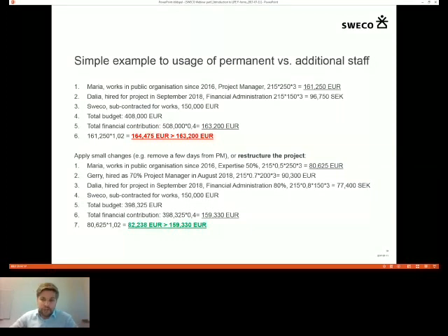Staff costs: should all employees be precisely projected and included with their targeted and existing salaries? Not precisely projected. It's enough to create categories. For example, that you have 3 categories. You have a junior staff member, you have a senior staff member, and you have a project manager.